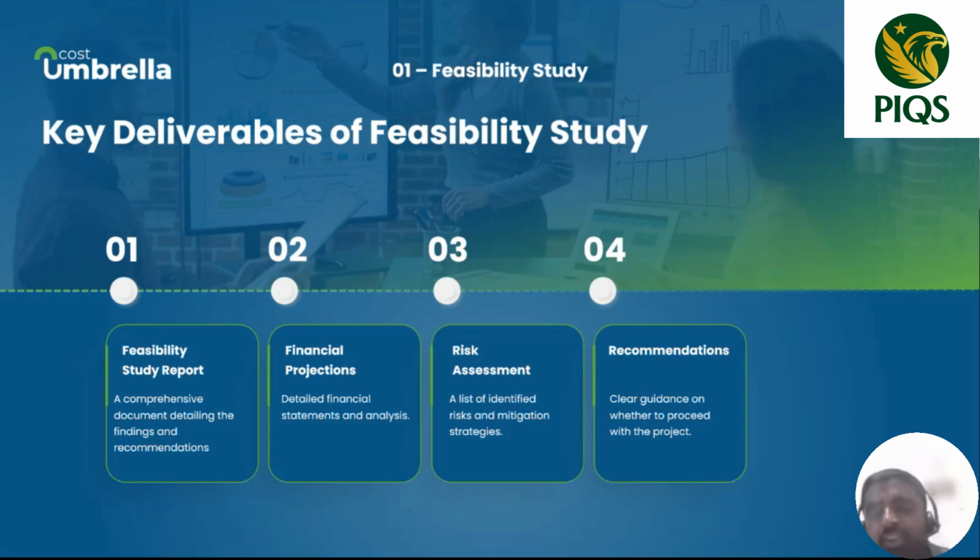So obviously your feasibility report should have the identified risk reflected in monetary terms, rather than saying, oh, this is the risk. You can say, if you're going for that decision, you may have a chance of loss of 50 million, which gives the real impact when you're talking in monetary terms. Obviously, you have to talk financial projection. That's called talking the information in monetary values.